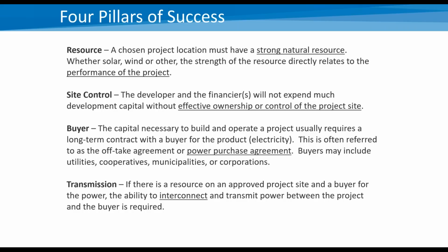And then finally is the transmission component. So if you have a resource on an approved project site and a buyer for the power, but you can't get to them because you can't interconnect or transmit power, then the project's not going to go anywhere. So you really have to have that ability to deliver your product to your buyer. Slide 22.